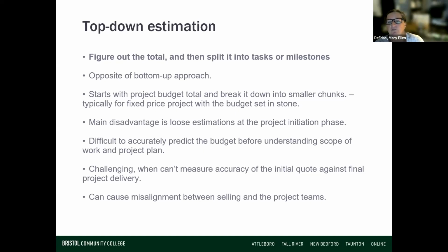Okay, so this works well when somebody says, you know, I have $3,000 to renovate my bathroom. What can I do for $3,000? All right, for $3,000, you can paint and you can replace some fixtures and we can make it look fresh, but you're not gonna gut it and you're not gonna redo the whole thing, right?